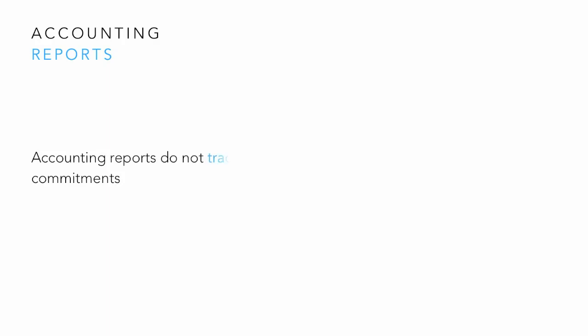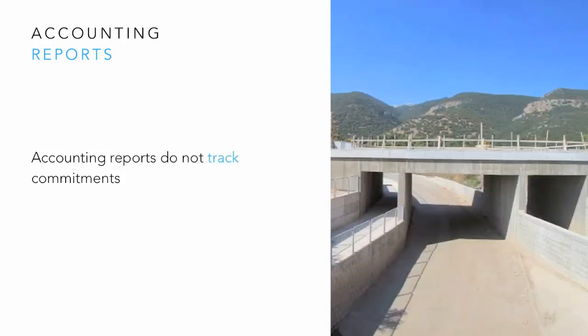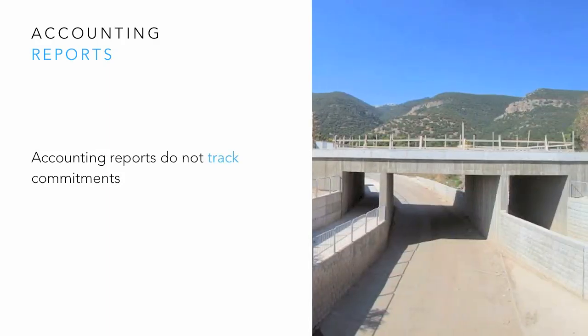Accounting reports do not track commitments. Accounting reports provide information for expenditures, but most do not track commitments. Without keeping track of commitments, you cannot accurately forecast how much money will be spent.